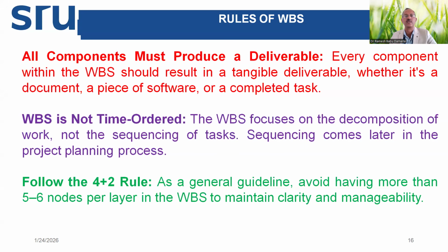Then all components must produce a deliverable. It should not be intangible or not measurable. It should be a measurable outcome. It can be a simple document also, a planning document, a drawing made, a design made. Designer should not say, I have imagined and it is there in my mind, I'll execute. No, it should be in a computer aided design, CAD or AutoCAD, or in a drawing shape, so that others can see and refer to it. Or it can be a part of software, an algorithm, or a flow chart, or code, or an assembly of mechanical, electrical, civil, electronic, any nature.